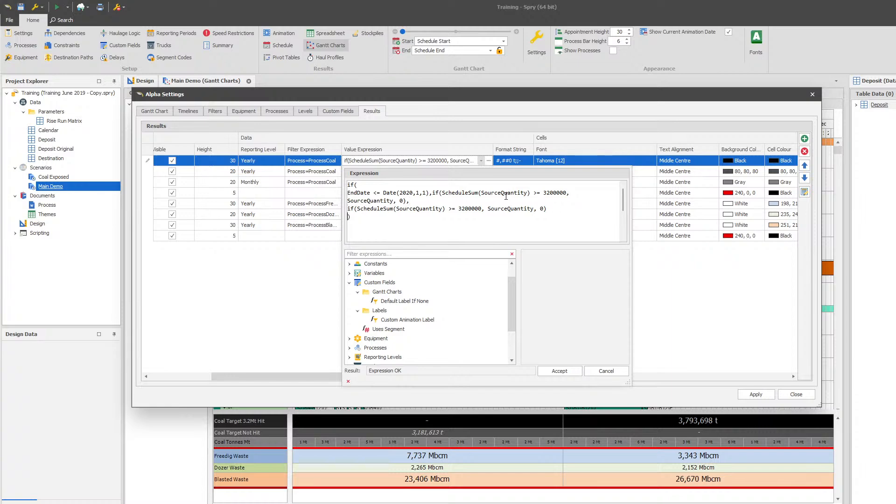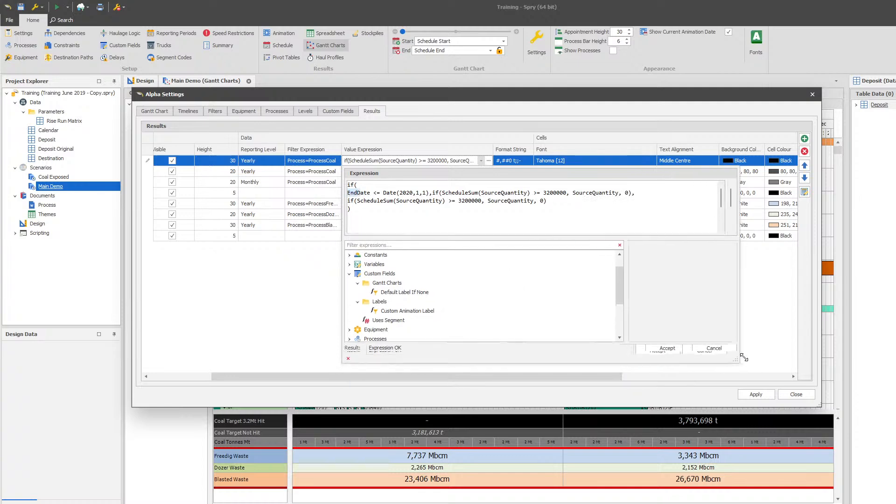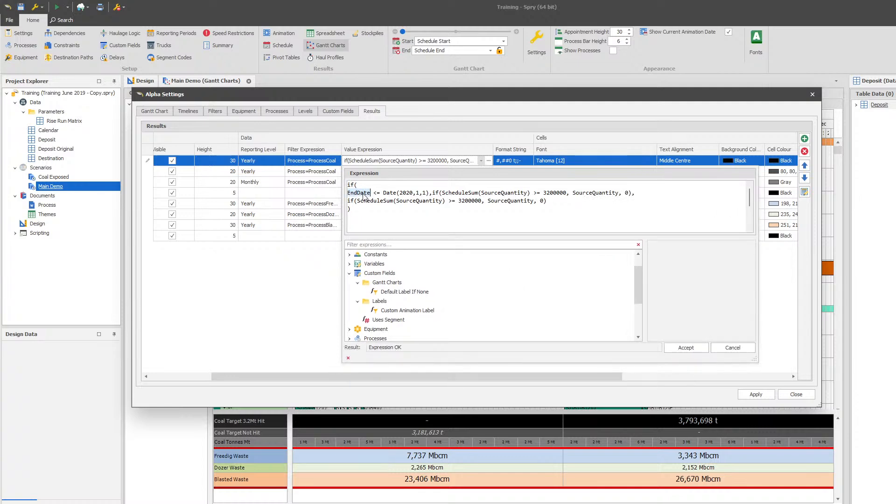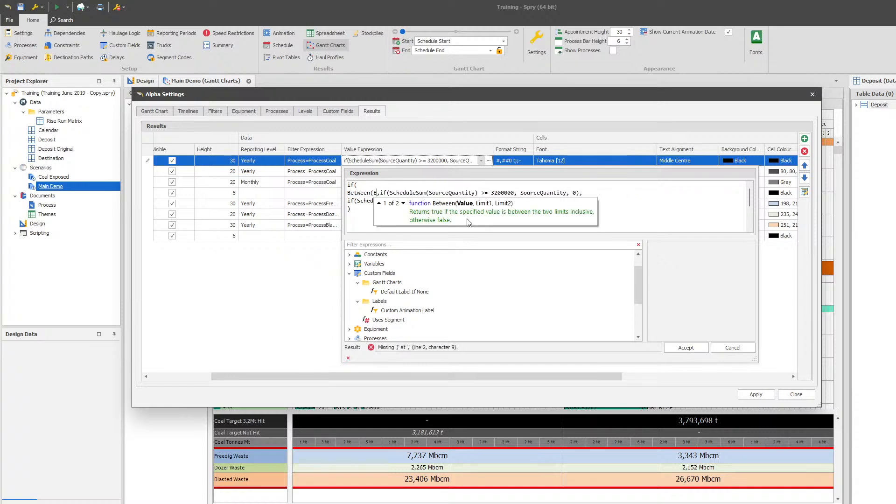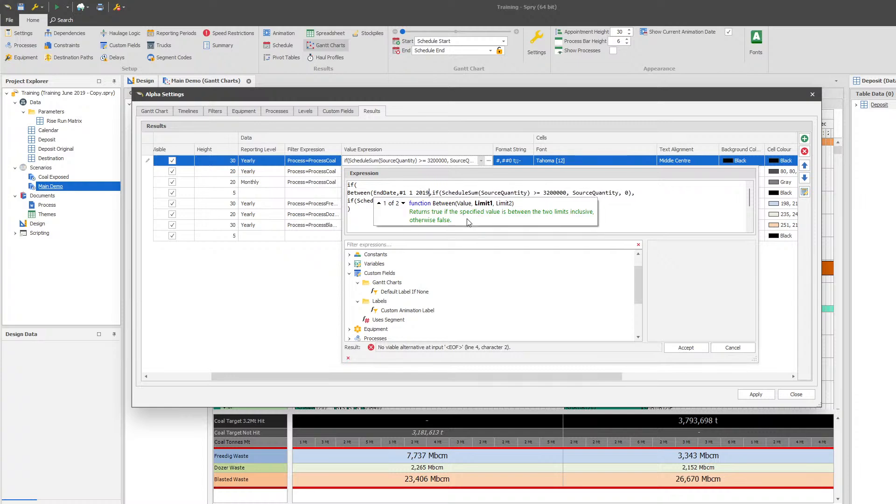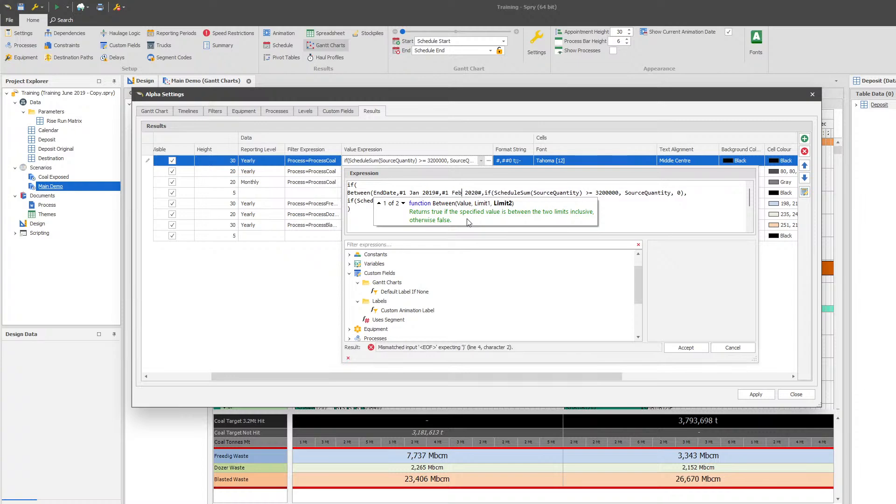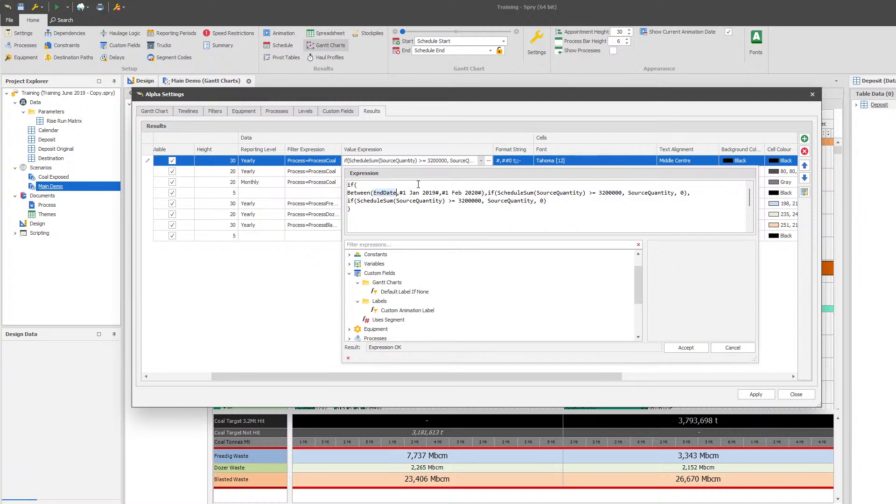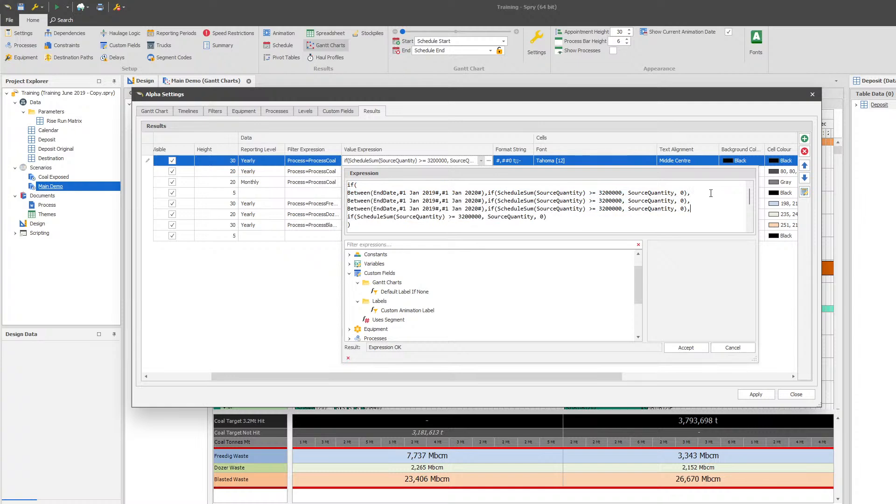So what that looks like is something like this. So make this a little wider. So if the end date is less than this one, so basically anything in the first year, you might want to do a between with your dates instead. So if you want to do between end date, I like to use the hash system for dates, so 1-1-2019 and 1-1-2020. I even actually, for what it's worth, prefer to do the month with a few letters just so that it's really clear depending on which time zone that you're in. So if your end date is between these two dates - not February, sorry, January should be - then give me, and the source quantity is less than this. And then what you do is you just take that line and you just continue to plug in different dates here. So you can have a different target for 2021, different target for 2022. Unfortunately this is the neatest way to do it.